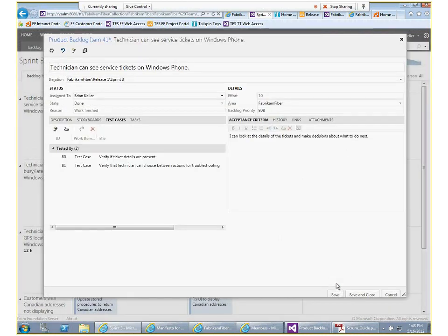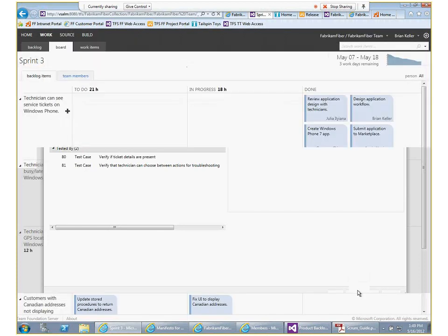What it means is that I've now mapped my verbal acceptance criteria for my stakeholder to something that is testable, right? That the tester or the developer who's doing the tests, remember that everybody in the team is a developer, will be able to then create something that maps to those. Of course, don't take that for granted that by passing all test cases the acceptance criteria is fulfilled. You can only say that if the customer says or adds something in the acceptance criteria that this should be fulfilled by test whatever, right? Because sometimes customers will have an idea of what their acceptance criteria is and you're not sure, so that's why you have to refine it so that the developers and testers understand very well what the acceptance criteria is. Save and close this.